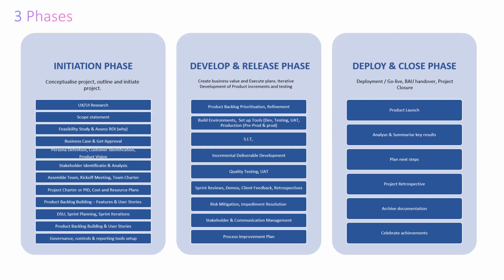So when you talk of analyze and summarize key results, what are you talking about here? The benefit review plan. Is that what you're saying? Are you analyzing your benefit review plan? You haven't got that benefit review plan captured anywhere. If you want to analyze that here, you must have done the benefit review somewhere before you get to the last stage. You can't be analyzing what you haven't even planned.